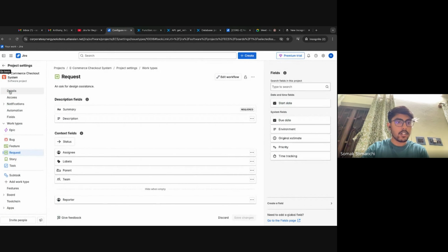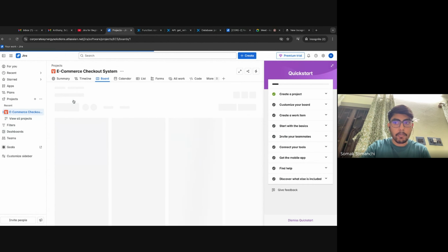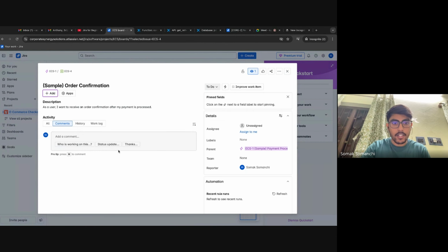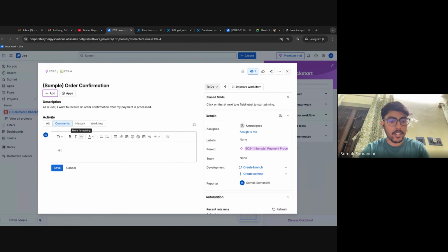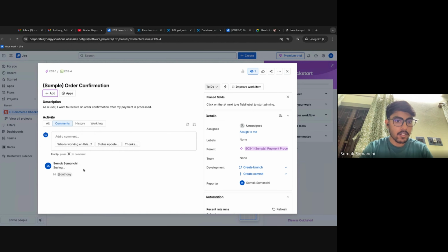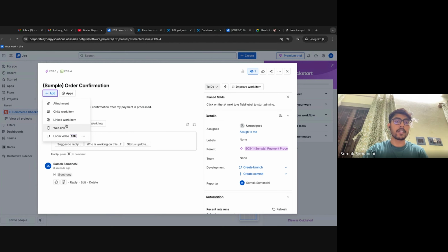Oh, wait. Let's go to, this is the project, and here if I add Anthony, maybe your, right, so we can pin each other here, and then we can basically review what each other is reviewing or suggesting, any comment. And then there are multiple things to be added here. We can add a Loom video, we can add child work items, which is very important, is dividing a big task. What we are doing right now is the recommendation system and putting that into smaller tasks.